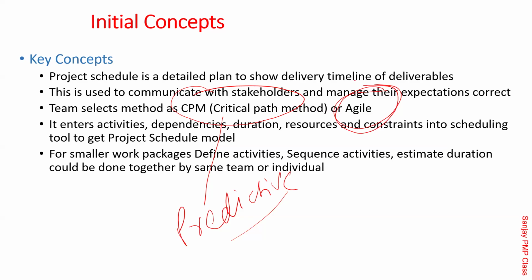And in real life, Shishir, it will always be hybrid. You will be doing a combination of it. Some of the deliverables you would like to do with a critical path, and some of them you will continue to do in Agile. For example, if it is rolling out some new automation, the hardware network, all that you will do using the critical path method, while software development and integration you will do in an agile way. So it's always a combination of them.